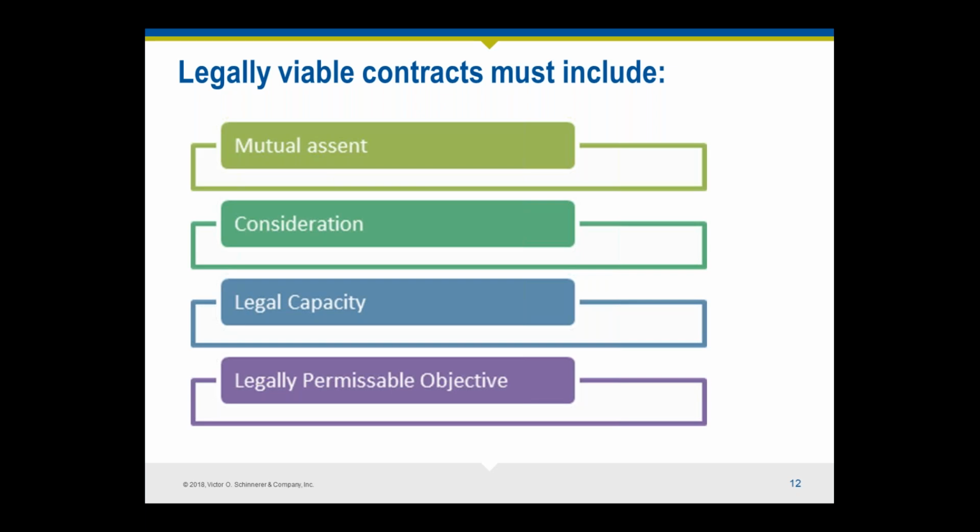One thing I've learned when I used to handle claims is that probably 85-90% of the time, if a design firm filed a claim or a lawsuit against their client for fees, that was going to result in a counterclaim from the client saying, well, the reason we didn't pay you was because you were negligent, your services were inadequate or ambiguous or delayed us, or whatever the allegations may be, and then you're off and running. So it's very important to try to avoid having fee disputes in the first place. Stay on top of being paid and address the issue if you're not getting paid.